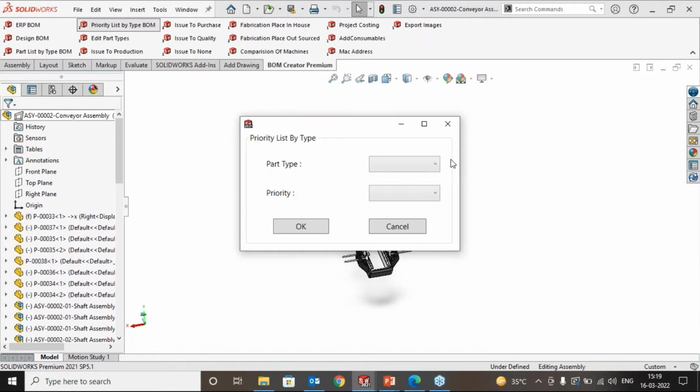There is a component, if I release a drawing today, it could be manufactured, let's say, in 2 days of time. There is a component which could be made in 5 days of time. So every manufacturing part has some kind of manufacturing lead time, right? It has its own manufacturing lead time. Similarly, for the purchase items, if we place an order today, it could be, let's say, delivered in 3 weeks of time. There could be an item which I would get in 2 days if I order today, and so on, right?